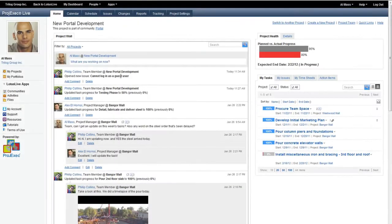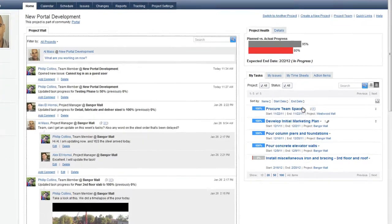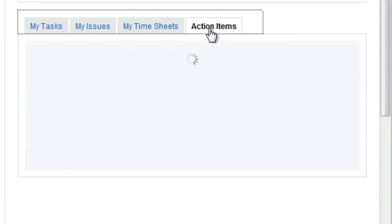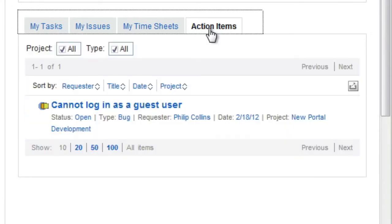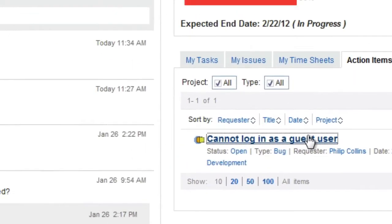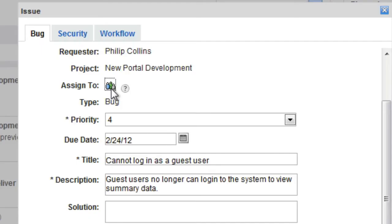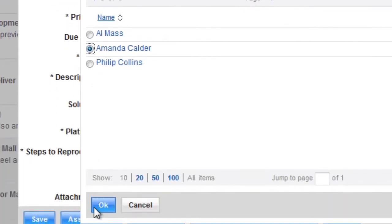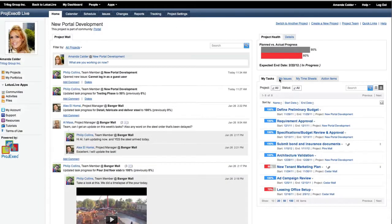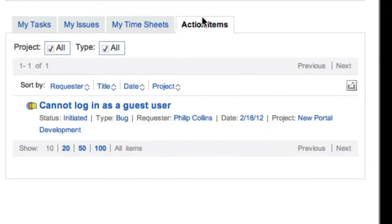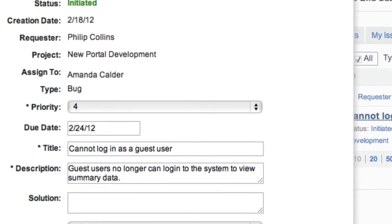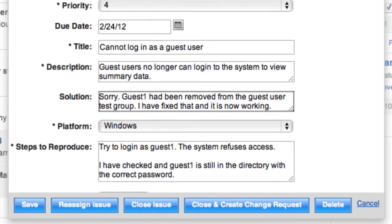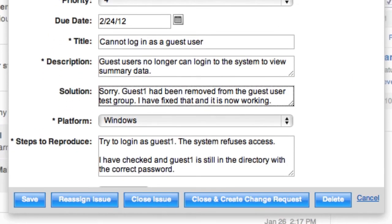Al, who is one of the project managers, logs in and sees the issue in his action items for the day. He assigns the issue to Amanda for completion. Amanda receives the issue, resolves it, and notifies the team by closing the issue.